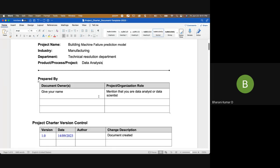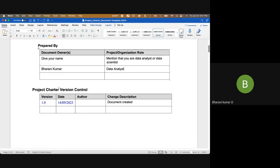For example, I can say my name is Barney Kamar and I am a data analyst. Next, the project charter version is very important. You'll be the author, and other people can also make changes. The project charter is created not just by individual team members but by the project sponsor. Whenever you do small changes to the document, you put it as 1.1, 1.2, etc.